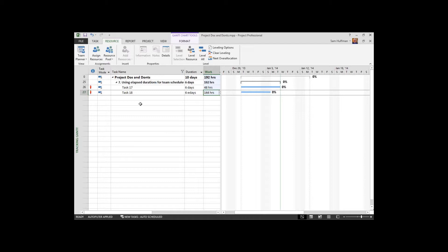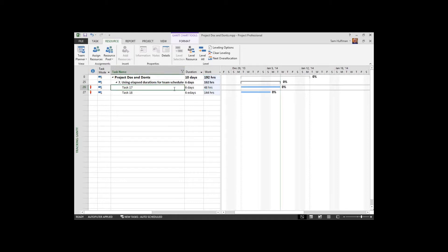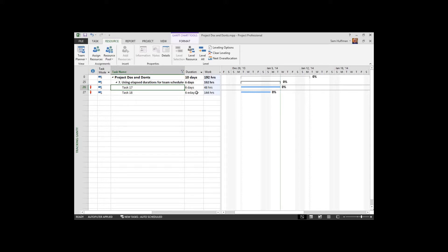So resources that you would assign to an elapsed duration event would be things like machinery that can be running 24-7, not people. Durations themselves are what are used for the human aspect of the project. Things like servers backing up or being upgraded or those types of tasks where we are working 24-7, that's what was intended here with the elapsed duration units.